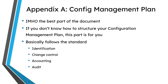And finally, there is Appendix A, which is on the configuration management plan. In my humble opinion, this is the best part of the document. If you have never written a configuration management plan before, this will give you an outline for doing it. It basically follows the different major clauses in the standard, covering identification, change management, configuration management accounting, and configuration management audits.